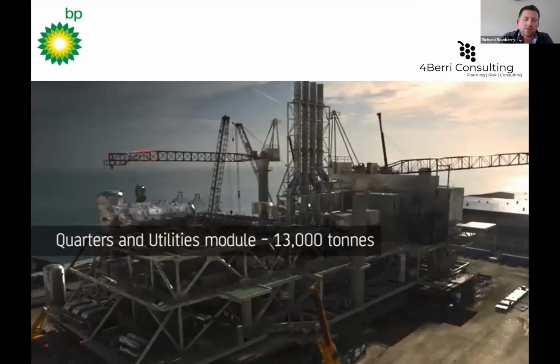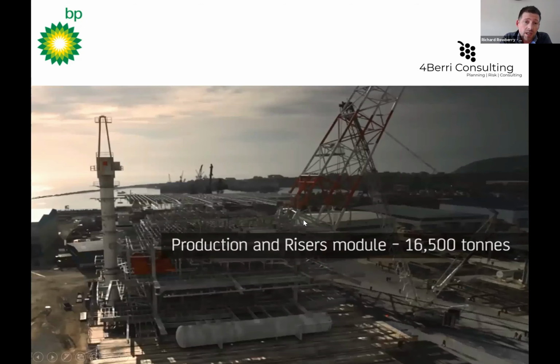So a few graphics here on the complexity of the project. Hopefully the video gave you an idea on the size. We've got some topside units here where the workers would stay. It's 13,000 tons in weight. Then you've got a secondary topsides platform where the production risers come through from the seabed, and this is at 16,500 tons. These are fabricated onshore and then lifted onto a barge via a hydraulic system.